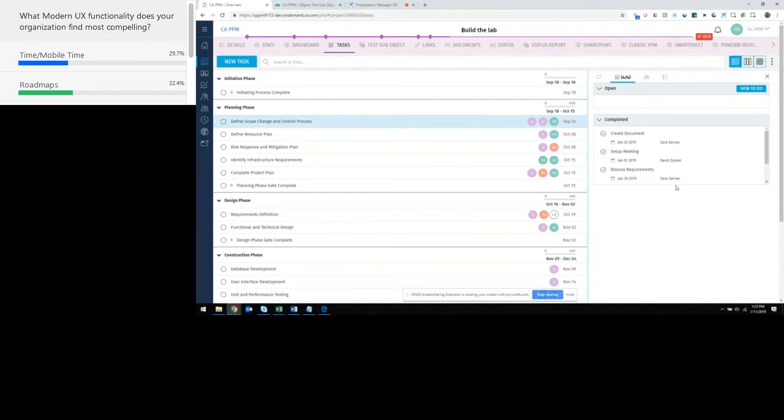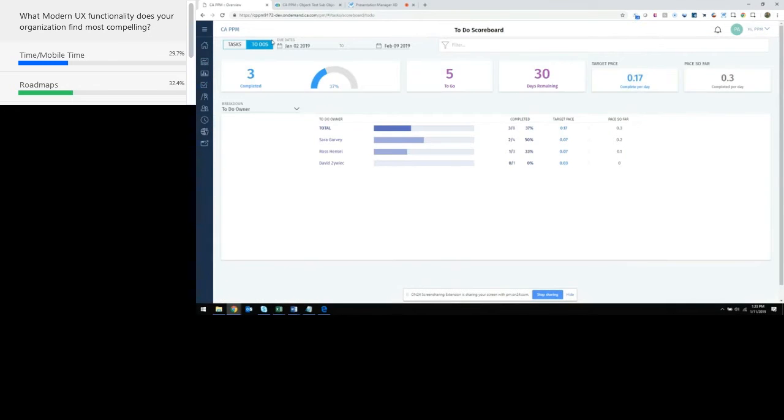So it's another way, utilizing that to-do board, that scoreboard, for an Agile or project manager, Scrum Master to go in and really drive in on those changes that they're seeing from all those tasks and monitor what their team members are doing without having to create mundane tasks for each one. Did you put your time here? Did you put your time here? I can just go through and say, you're going to get 50 hours of ETC for this task, and then these 5 to-dos need to be done.